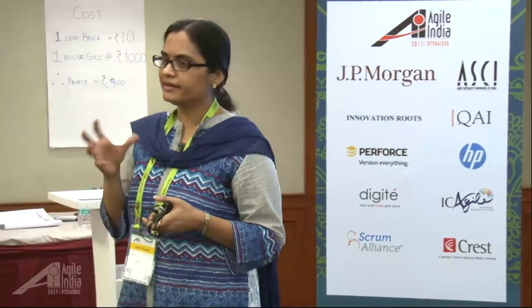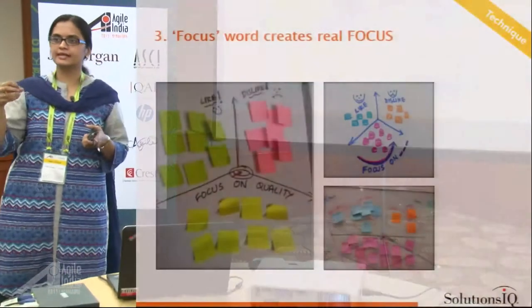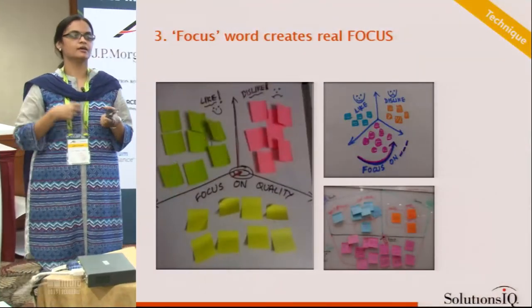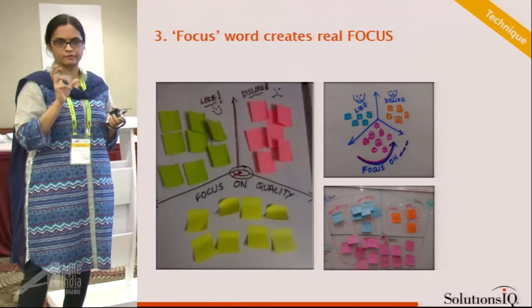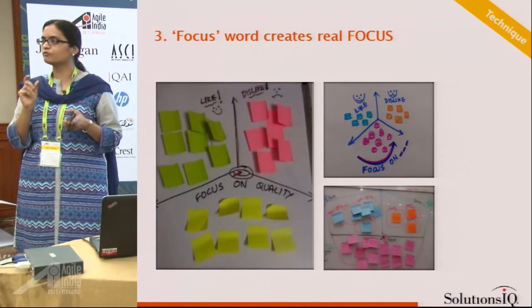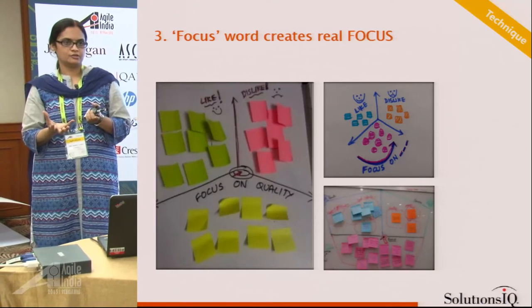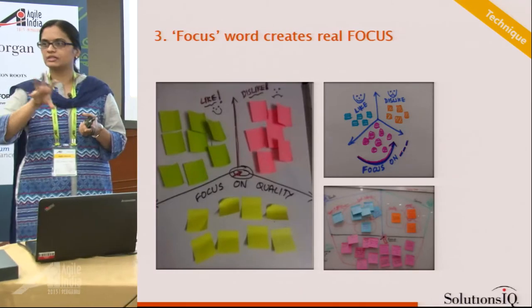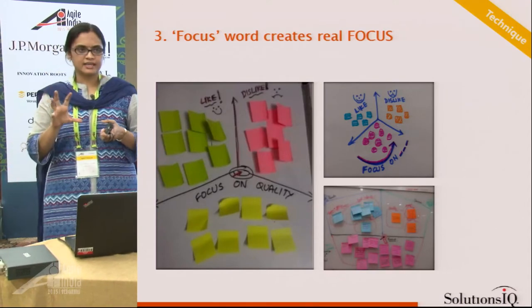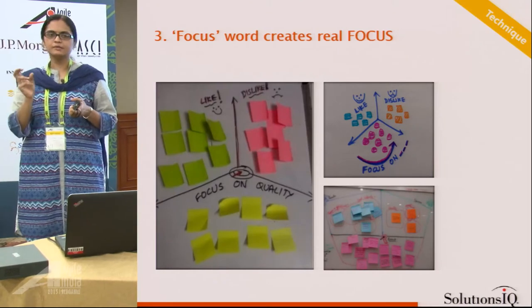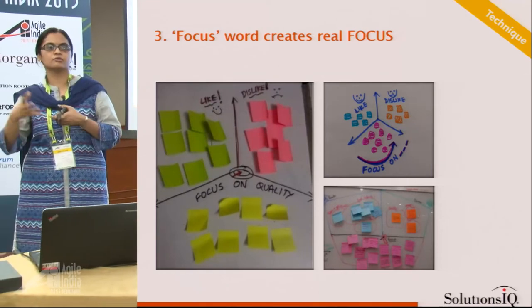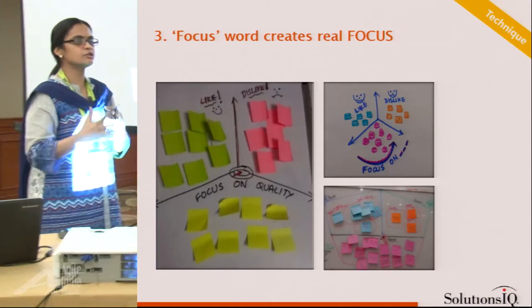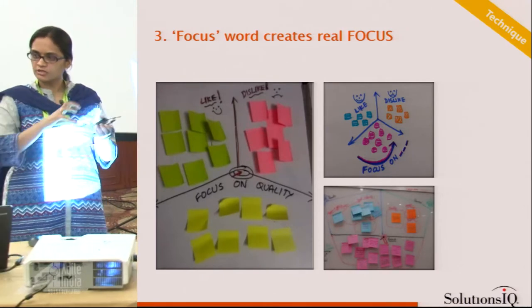One technique: one focus word creates real focus. Whenever I wanted my teams to focus on a specific aspect — for example, I was seeing repeated bugs and technical debt — I really wanted the team to focus on quality. What I did was add a specific focus quadrant to the normal retrospective technique, and that really helped. You can customize your existing retrospective and add a specific focus quadrant — focus on quality, story-to-done ratio, velocity — whatever you want the team to retrospect on.